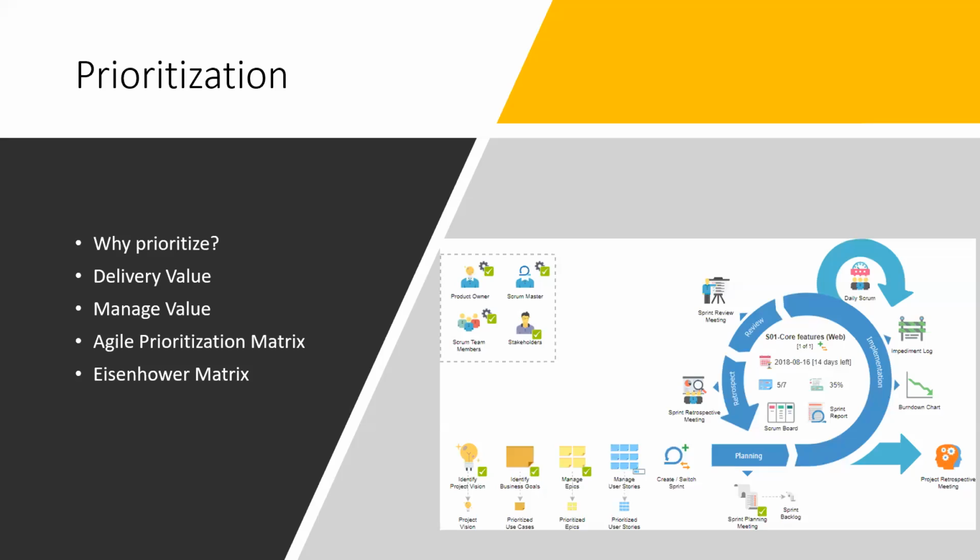But what do you think from your end? Will you be able to deliver the high priority items at the moment? There may be a case where the infrastructure is not ready for the highest priority item to go through. There may be a case where you're still onboarding people. There may be multiple cases like risks and constraints with respect to time, scope, and budget. Even the project sponsor is not yet ready to give a go ahead to the project. So based on that moment, you make a decision to prioritize.